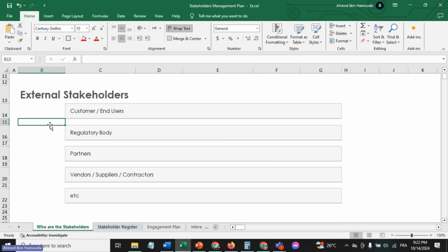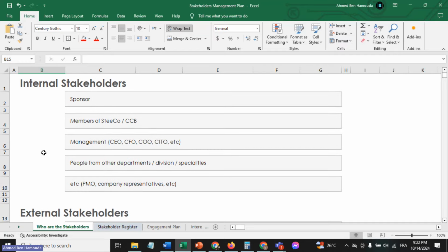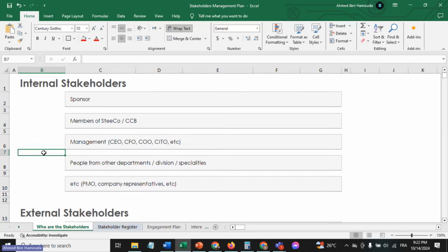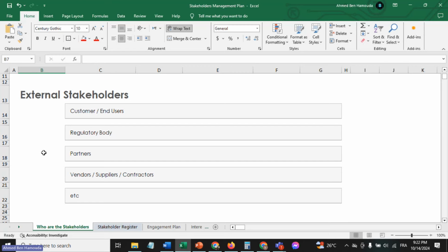And as we saw last week, when you draft the project charter, then you will need to include the most important stakeholders with the highest influence in that charter. So then they can sign the charter and commit to the project. So that's just to help you have an initial idea on who could be your stakeholders. So when we provide you with this template, and whenever you open it and you're starting a new project, have a look at it and think.